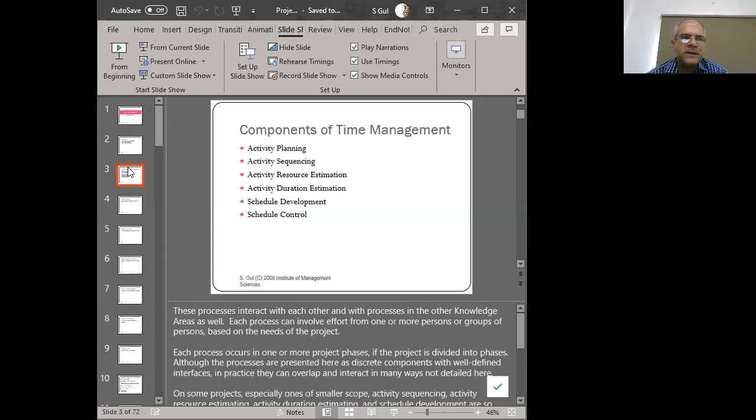But if this 40 hours of work has to be done in, let's suppose, 2 days, then one person cannot do this, because that person has to do about 20 hours of work in a day. So if that person works for 2 days in this type of environment, they'll be able to finish that 40 hours of work in 2 days. Clearly this is a violation of a lot of the HR rules, and there are safety and health concerns as well, because you really don't want people working 20 hours per day, meaning they don't get time to eat, they don't get time to sleep, they don't get time for their families and so on and so forth. So a 20-hour workday is unrealistic.